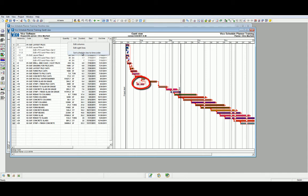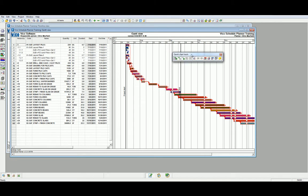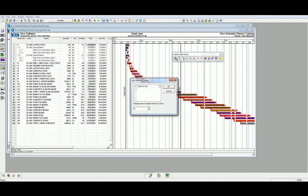Let's keep an eye on the strip and finish of the Pile Caps task. Note that it has been slotted in appropriately after the Concrete Pile Caps task. Let's head to the Gantt Chart View taskbar, pull it out and isolate it. We can use these tools to quickly edit the hierarchical order.